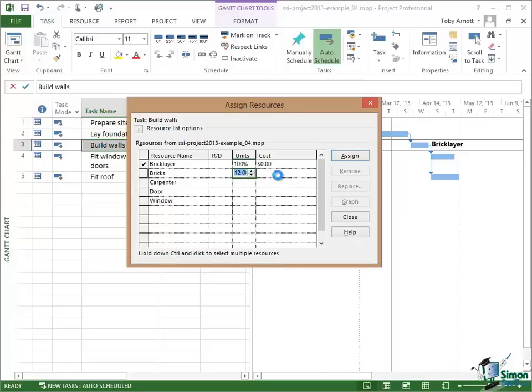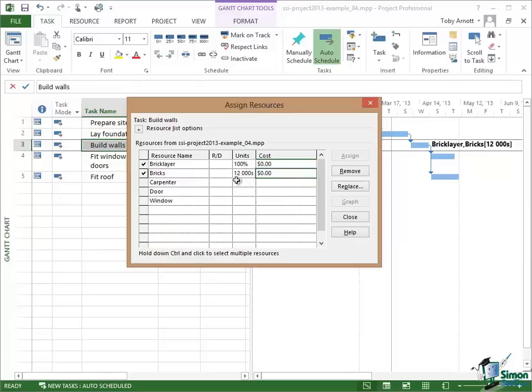Again, if I'd entered a cost per thousandth of bricks that cost would appear here. But it does say in the Units column there 12 and then my Units, Thousands. So it's 12,000ths of bricks.